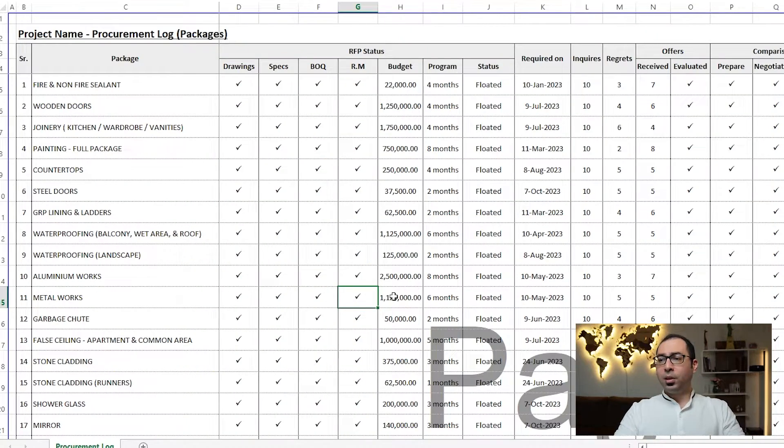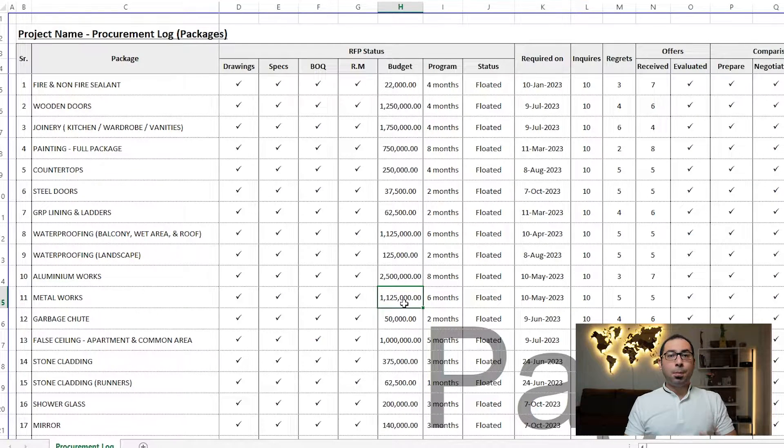The responsibility matrix is important because the subcontractor needs to understand exactly what his scope is. Apart from his main scope — for example, aluminium and metal — what about the storage area, electricity required for the work, material shifting, scaffolding? He needs to know what you are going to provide to him and what he is going to provide himself, so he can account for that in his pricing.